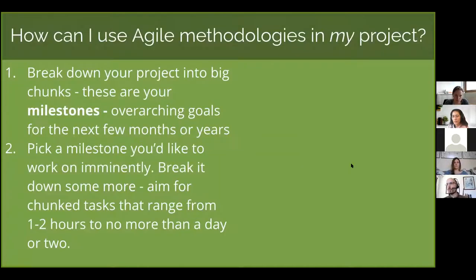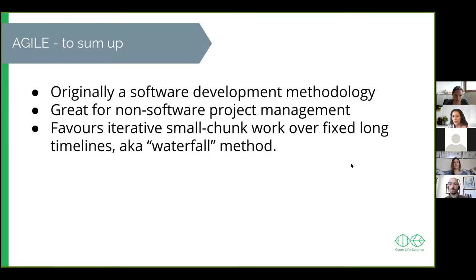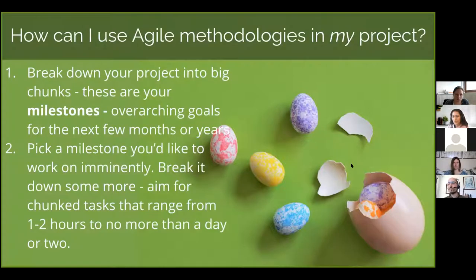And then there's lots of variations in terms of how this is structured, and also in terms of advantages over the traditional waterfall method. So I mentioned breaking down things into tasks and milestones and so on. And I mentioned as well that you could aim for slices of 1 to 2 hours, ideally not more than a day or two. The reason for this fragmentation is because you want to have a good sense of progress.